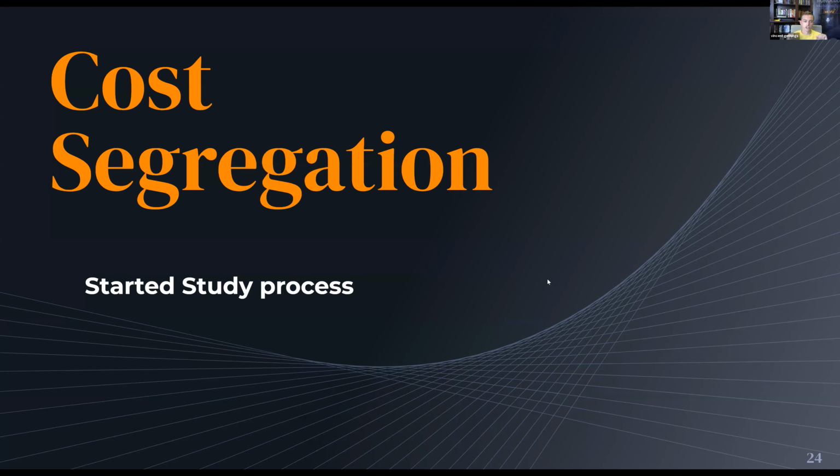We put it on an Excel sheet, and this is where our project management hat comes in. We ask them how long it takes, how much it's going to cost. We add a buffer to that, 10 to 20% is normal, the fudge factor. So if they say 2 weeks, make it 3, because there's always going to be something that comes up. They say 20,000, make it 25,000 when you actually are doing your planning. And that's how we do it.